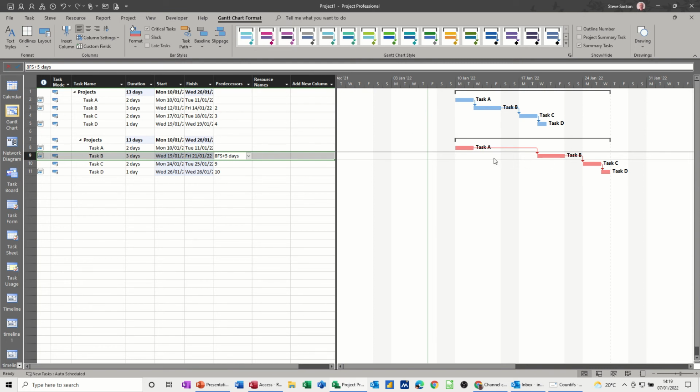So if you want to give yourself a bit of extra slack in a system, which is what all project managers want really, you can sort of show these lag times on tasks and it gives you the critical path, but obviously you've factored that in as contingency maybe. Now the top one hasn't gone red anymore because this one is now affecting the end date of the project.